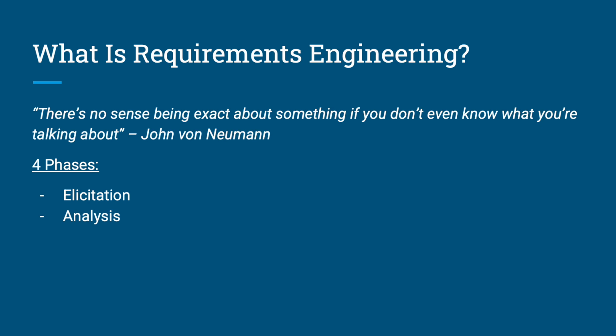An example of conflicting requirements could be a request for completely on-premises equipment and support, coupled with a requirement to keep costs as low as possible. One of these requirements will have to be adjusted if equipment, infrastructure, support staff, etc. all need to be purchased for an on-site solution. That's definitely not going to be the most cost-effective way to build a system, where something like having portions of the system in the cloud may be cheaper. It's good to discuss these things in the beginning.